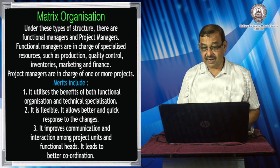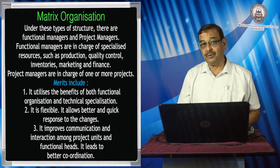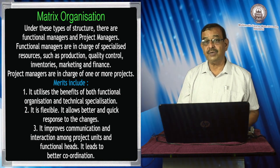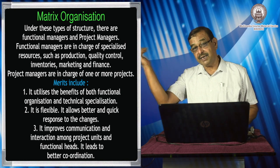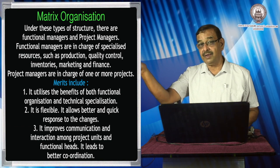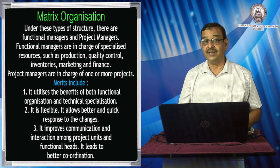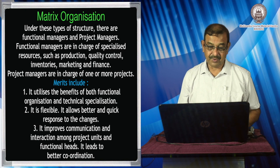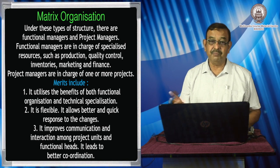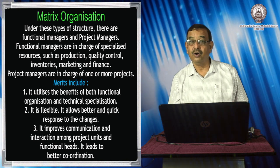The third type is matrix organization. Under this structure, there are both functional managers and project managers. For example, in NEEPCO, there is a Chief Engineer Electrical at headquarters, and in the project there is also an electrical engineer as well as a project manager. That electrical engineer might receive commands from the project manager and at the same time from the Chief Engineer Electrical at headquarters. Functional managers are in charge of specialist resources such as production, quality control, inventory, marketing, finance, and engineering, while project managers are in charge of one or more projects.